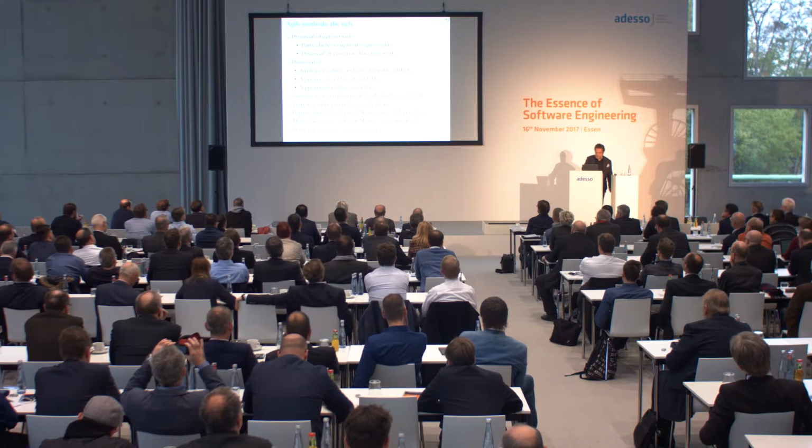The replacement of abstract requirements by user stories. This is a really bad idea. You get systems that perform the user stories, yes, sure, and nothing else. It is very simple. Good systems are precisely those systems that can adapt to various scenarios. So I'm not saying user stories are a bad idea. They are a bad idea as the basic source of requirements. They are very useful as tests, as validation of requirements, but not as requirements themselves.